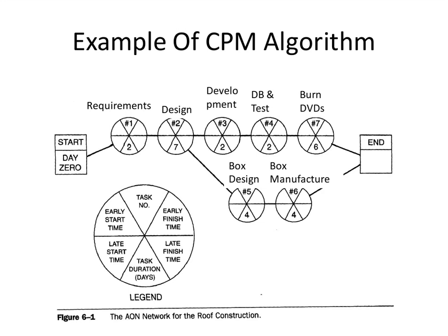You can have multiple critical paths. There are cases. It's comparatively rare. What's more common is you have a shifting critical path. So what happens, and this relates to Kurt's Krugerian wisdom dispensed earlier, is that sometimes the actual durations are different than what you anticipate. And so what would happen, for example, here, ladies and gentlemen, if this task, number 5, that you thought would take 4 days actually ended up taking 8? Where would the critical path be then? It would be on the bottom. It wouldn't be on the top.